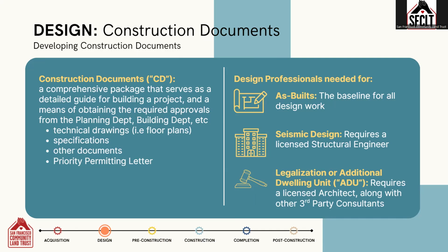The CD package may also include a letter for priority permitting if the lender is in a position to facilitate an expedited permitting process. Typically, the construction manager will need to engage licensed professionals to develop these documents. If as-built drawings aren't available, the construction manager will need to engage a designer to prepare these drawings. As-builts are drawings, like floor plans and elevations, that show the existing layout of a building and a property. These drawings serve as the basis for any design work.